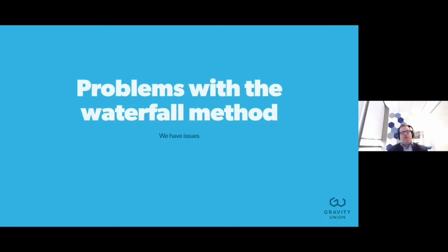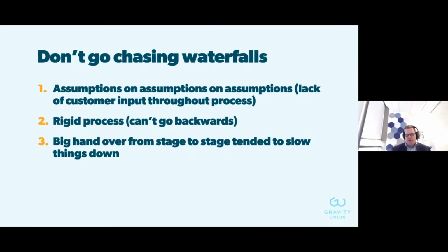There were some problems with the waterfall method. The one big issue is we had assumptions built on assumptions built on assumptions. Oftentimes, the client or end user would give us the requirements as a project team, and we would go off and do the analysis and the design and the build and the testing, and then it wouldn't be until the very end of that process that we would bring the end user back to view what we built. It was a very rigid process.